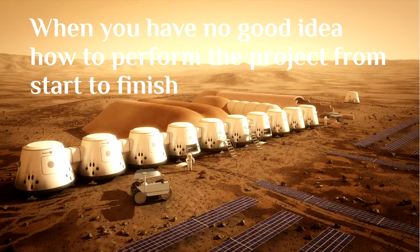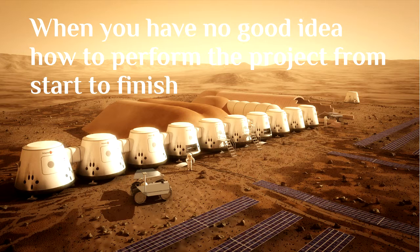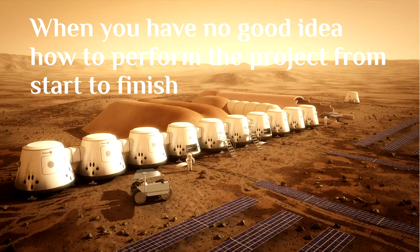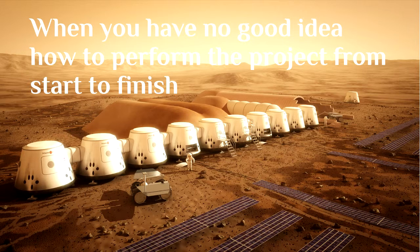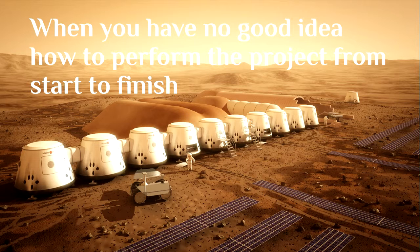At the beginning of such a project, is it possible to give a due date? Is it possible to build a network of all the tasks for the whole project? And have you any idea how long it will take, how much effort that will take? Probably not. Well, if you don't, then you have to break up your project into smaller projects, of which you do have a good idea.